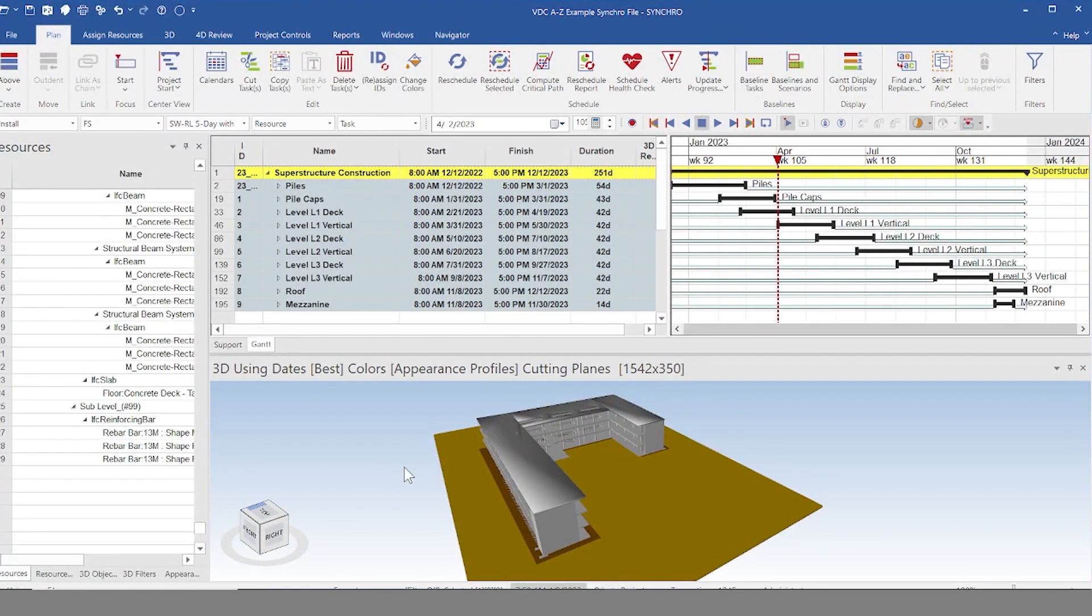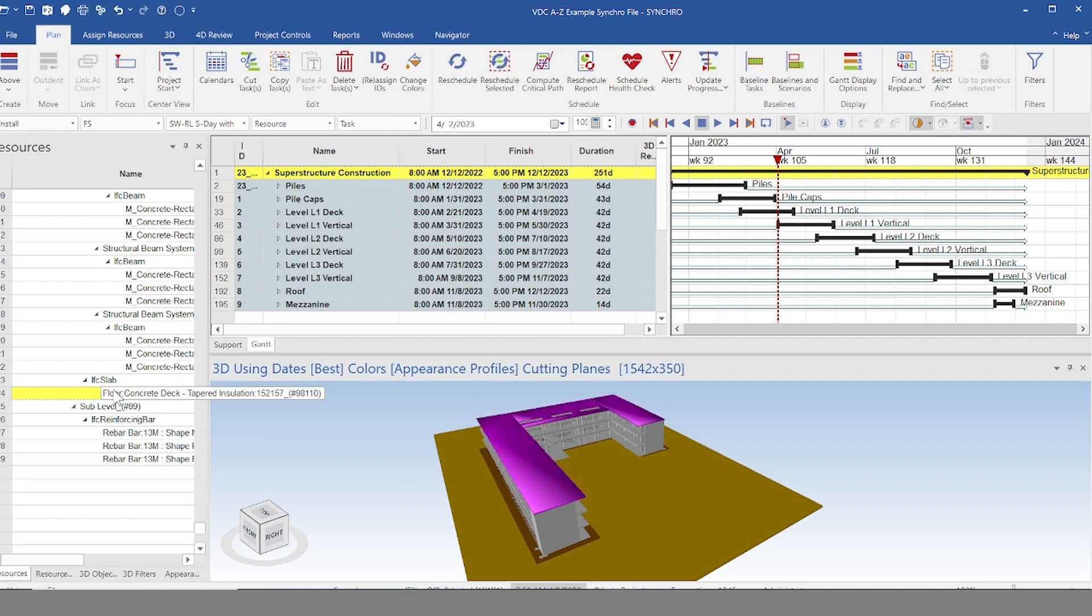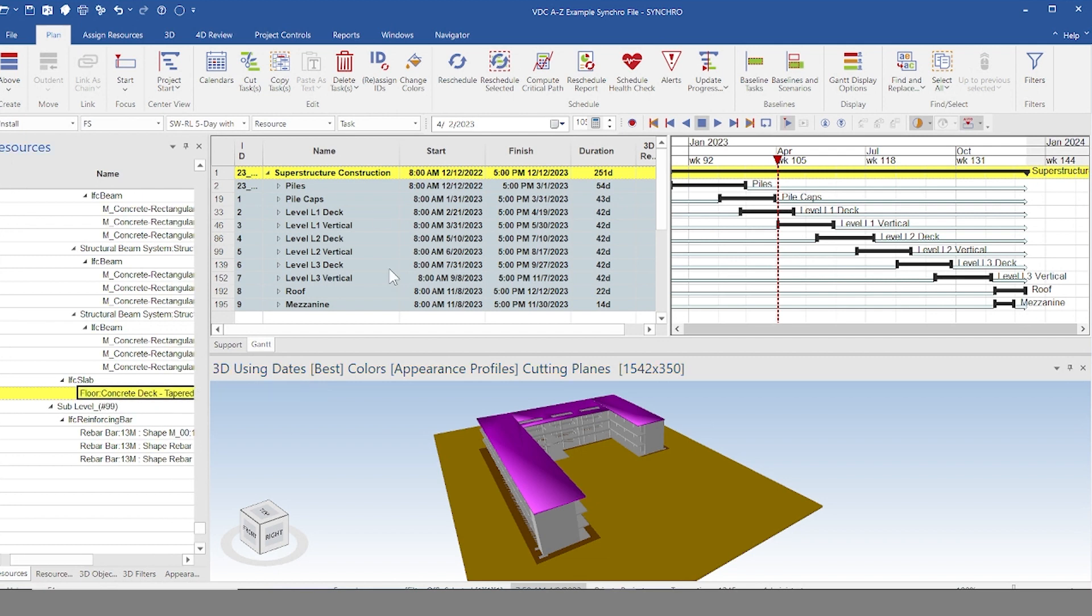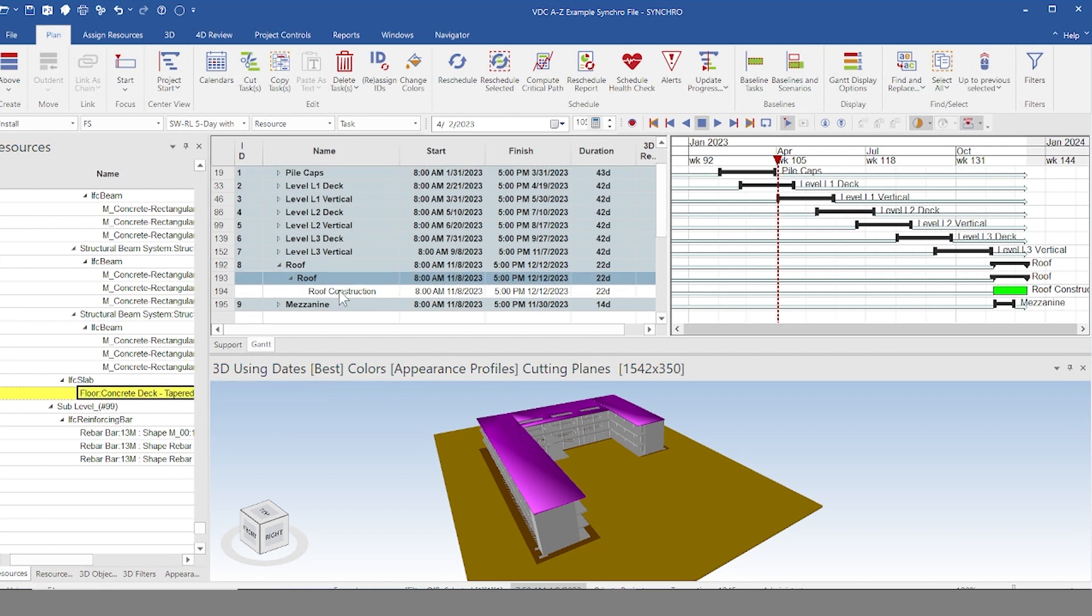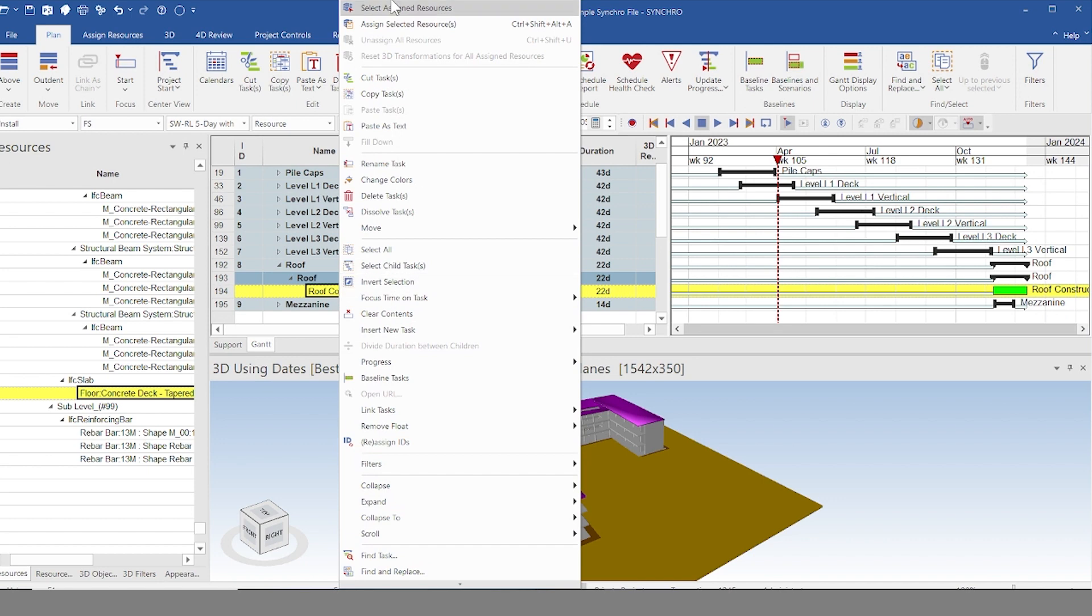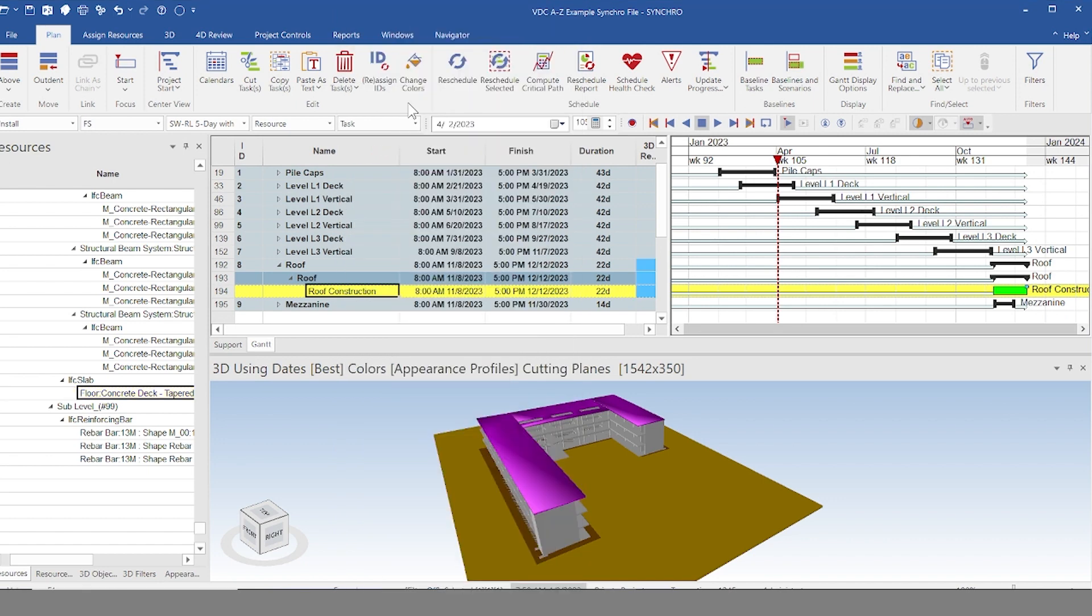So the basic concept of what Synchro does is pretty simple. You have your objects from your model and each of those are tied to a resource, and then you just click that resource and you tie it to an element of your schedule. And then when you're running the simulation, it'll know when to have that piece of geometry appear.